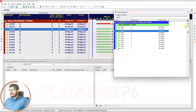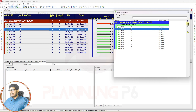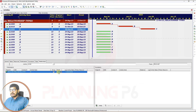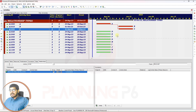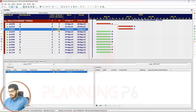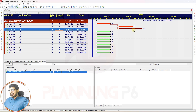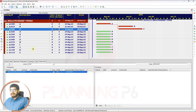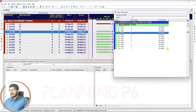Now we will assign Activity B as a predecessor and change the relationship type to Start-to-Start. You can see here Activity B and Activity C are starting together. If I increase the duration, you can see they remain starting on the same date but have different durations.